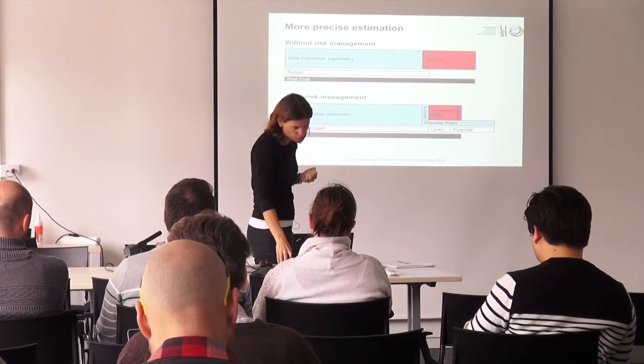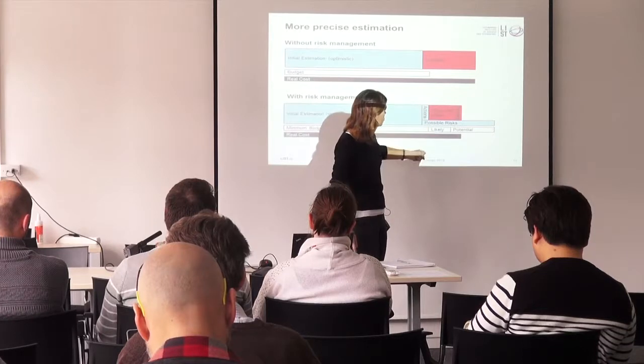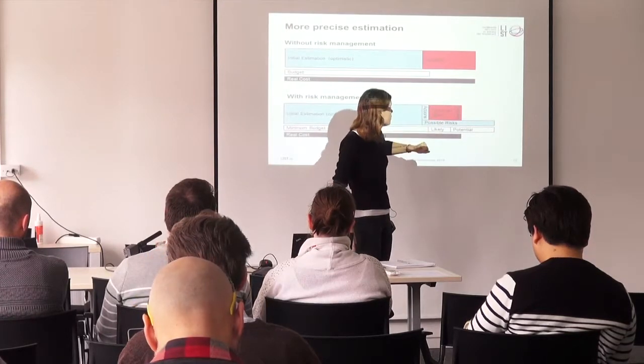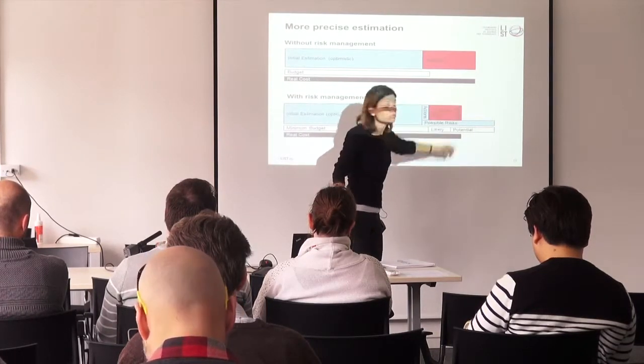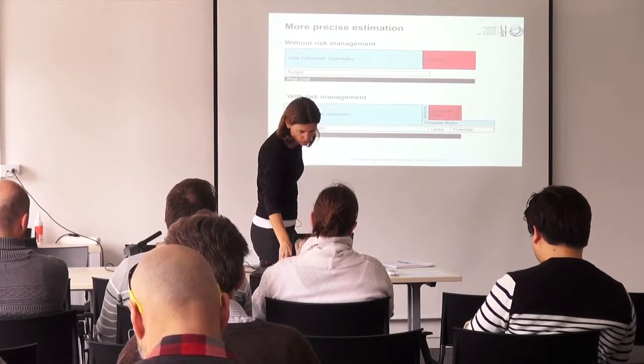Yeah, so your real cost is still everything that you had envisioned, plus the cost of the actions, plus the cost of the risks that have actually occurred, plus the cost of the incidents that you had not planned and you had not imagined.